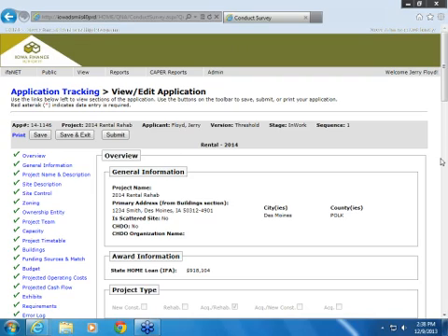One question is, if you have two proposed buildings in the same town that you want to acquire, should they be in two different applications? I'll answer that question real quick. Depending on what you're proposing, if you want to do a multi-site project and it makes sense for you to combine those into one project, then you can do that. If you want to submit two different projects, it'd be a scattered site project. If you want to submit two different projects, each standalone on their merits, you can do that as well. So there's really not a limitation there. Economies of scale usually comes into play when you're looking at spreading soft costs across two buildings that are in a somewhat confined area. So that may be the way you approach it.